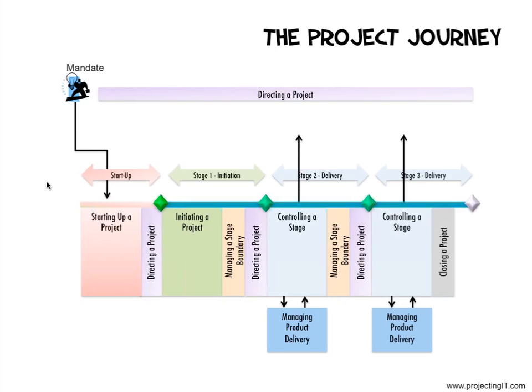As part of closing a project, the project manager prepares the end project report that describes how the project work was completed and also the performance of the project against the original PID. The baseline versus actual is compared. The project manager also compiles the lessons learned from the project and the team performance. If any activity or work was not completed, or if there are any open issues in the project, the project manager will document them as follow-on action recommendations. Follow-on action recommendations define the unfinished business of the project.